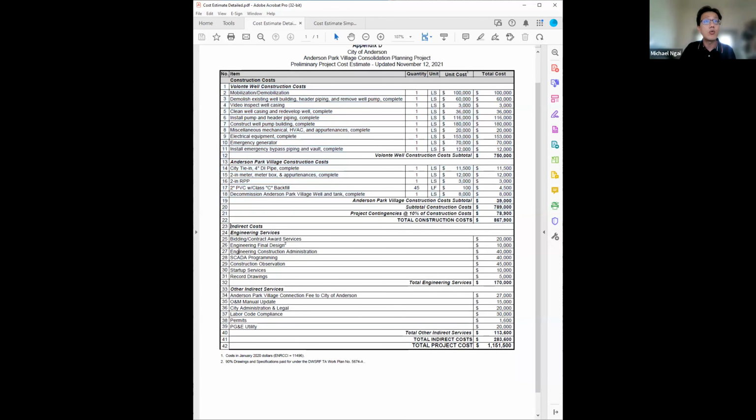So down here would be the indirect costs. These costs could come from planning, survey, permit, startup service like you see up there, SCADA programming. It could be from the system, from the construction management, easement, just any type of cost would go down here. Now, which one is which? Then I would need your help, because again,